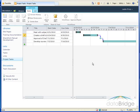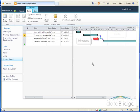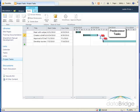If the task item is a milestone such as an approval date or delivery date it is represented by a diamond on the chart. The connector arrows represent predecessor tasks for a task. Predecessor tasks are described in the task list tutorial.